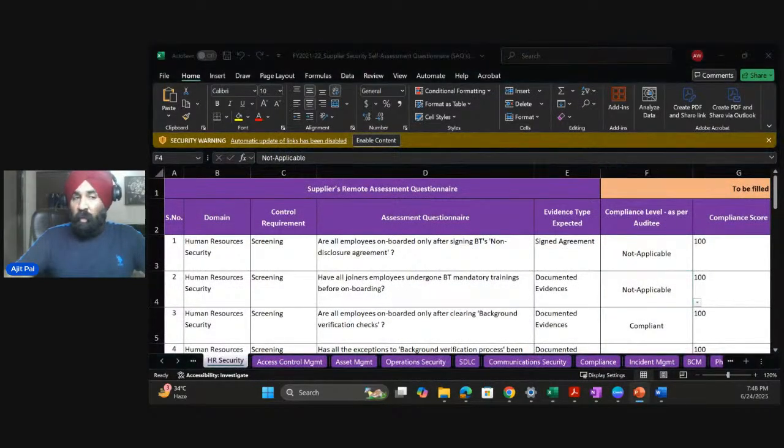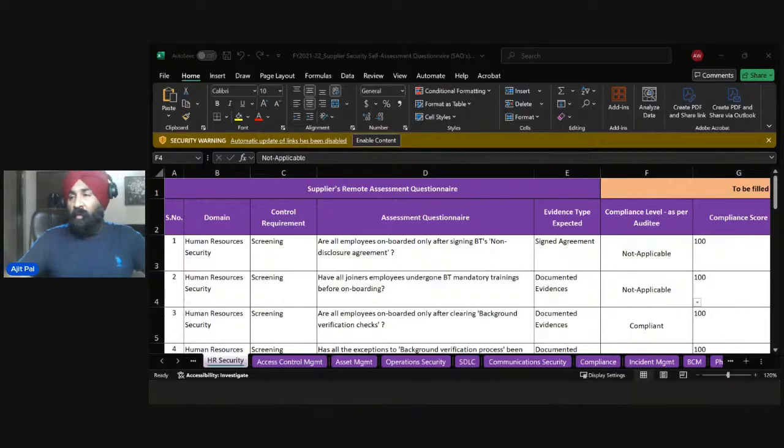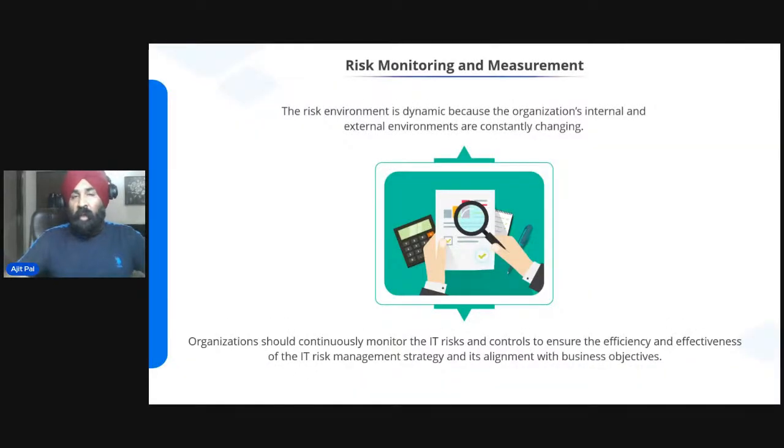So now the fourth phase. This is the sheet that I've showcased to you, that is a risk register. Once the risk assessment is completed, you will share this risk sheet, the risk register, with a risk owner, the business head of that department, and they will accept it. Once they accept it, it will be put into production, and we will regularly monitor it.